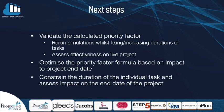There are a number of next steps we'd like to explore, all of which would require access to NPLAN's model. First, we'd like to validate the calculated priority factor. We'd then like to optimize this priority factor by looking at how changing certain variables would impact the project end date. Then we'd like to constrain the duration of an individual task and again assess how that impacts the end date.